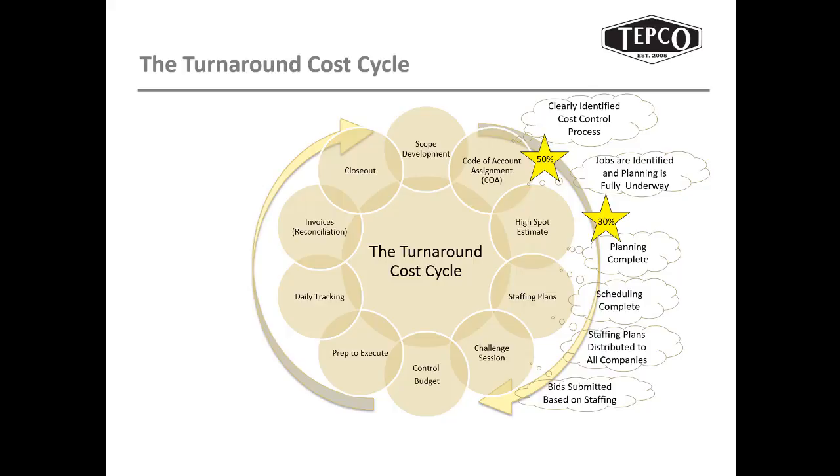They may walk the jobs and look at the jobs with work packages, but there's a session here that goes on. It's called a challenge session. So the bids are submitted, the packages are reviewed, and there's an agreement made on how many people they're going to bring on site to perform the work, or how much it's going to take. Now, these bids are broken down into specific code of accounts, and I'm going to discuss that a little bit more, but just know that the bids are pretty standard when they bid that job.